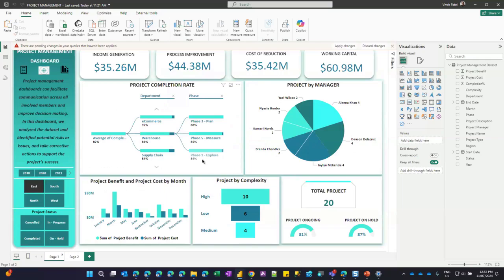But when you put in perspective right beside that the forecasted cost and actual cost, and you see those numbers together, say my forecasted cost is 35 million, I'm just giving an example, and this is actual, just within a second you can tell that I have gone more than forecasted. It is bad. So KPIs are the numbers that give you an idea about the trajectory your business or project is going in, in a second. That is why all the tops are KPIs.